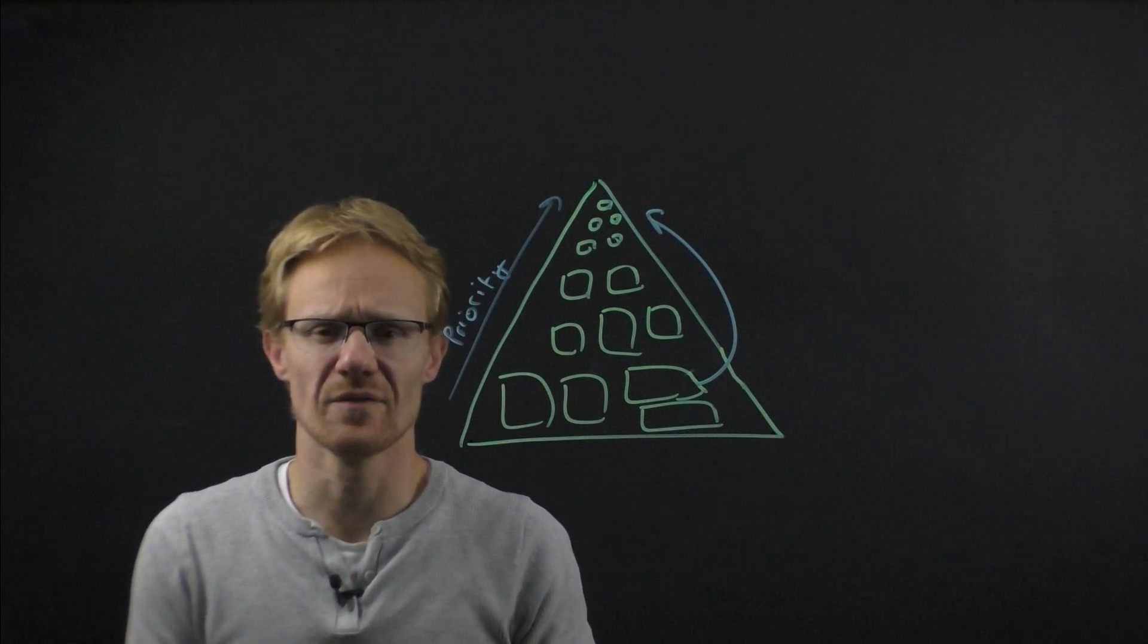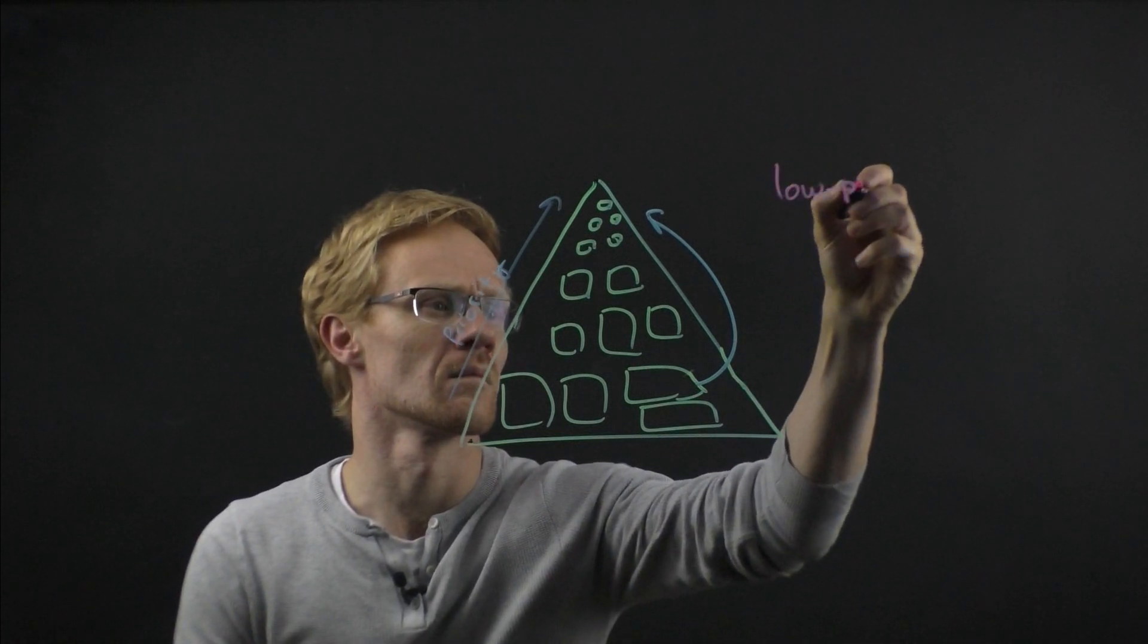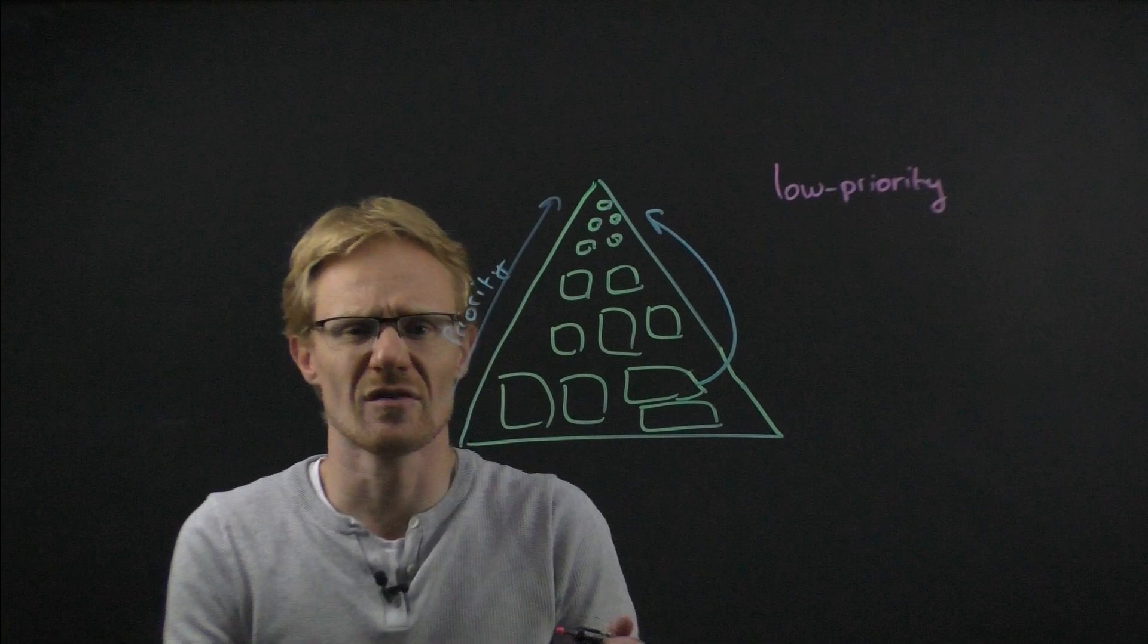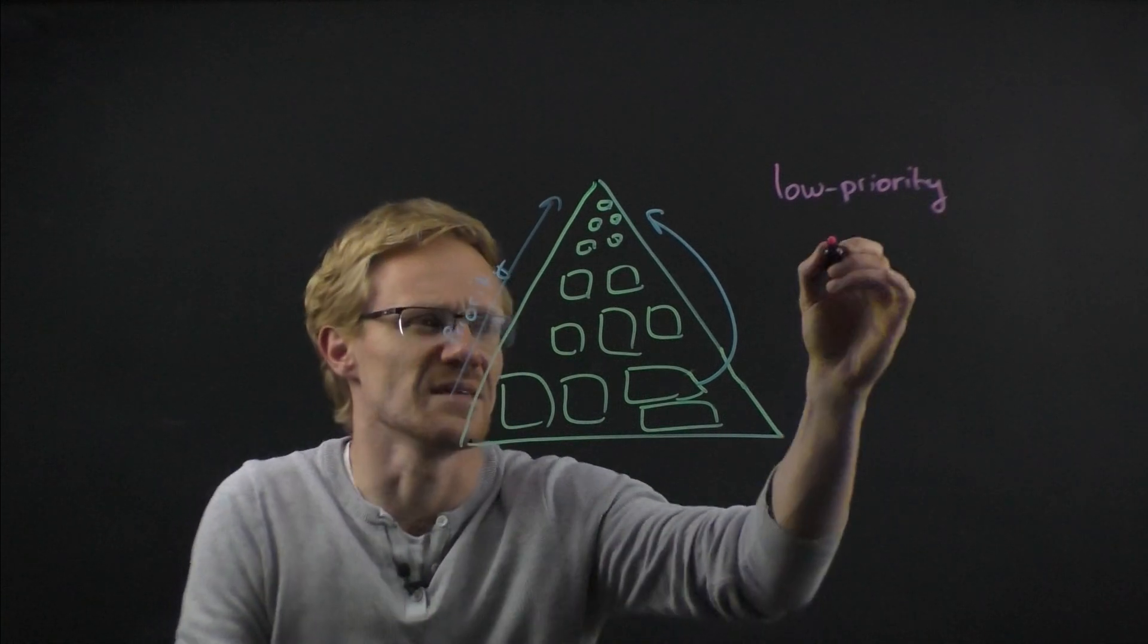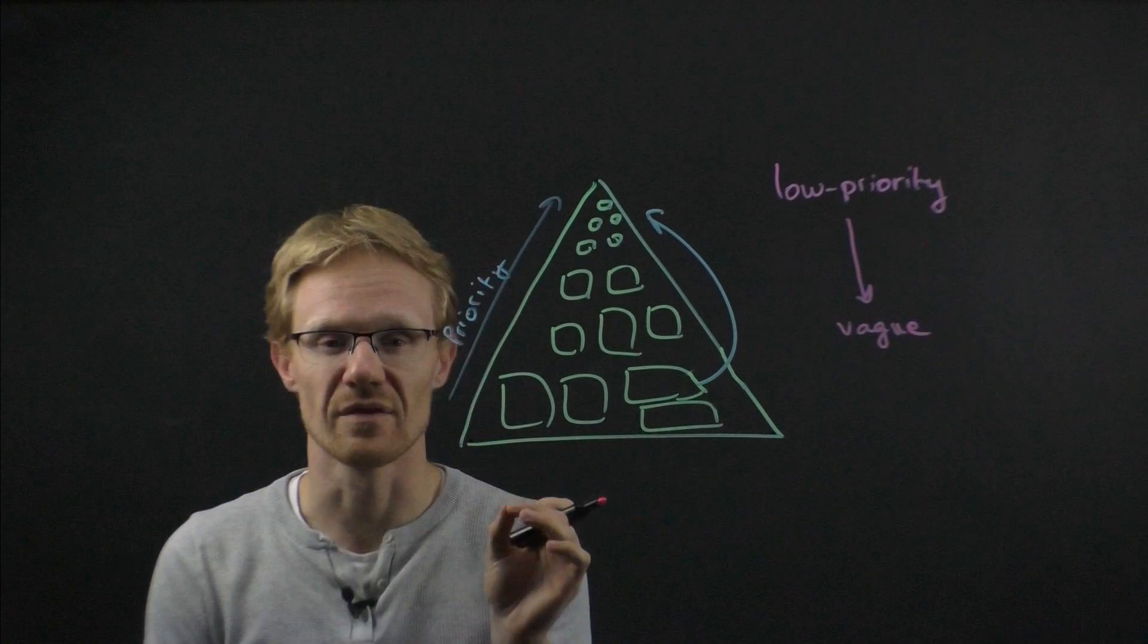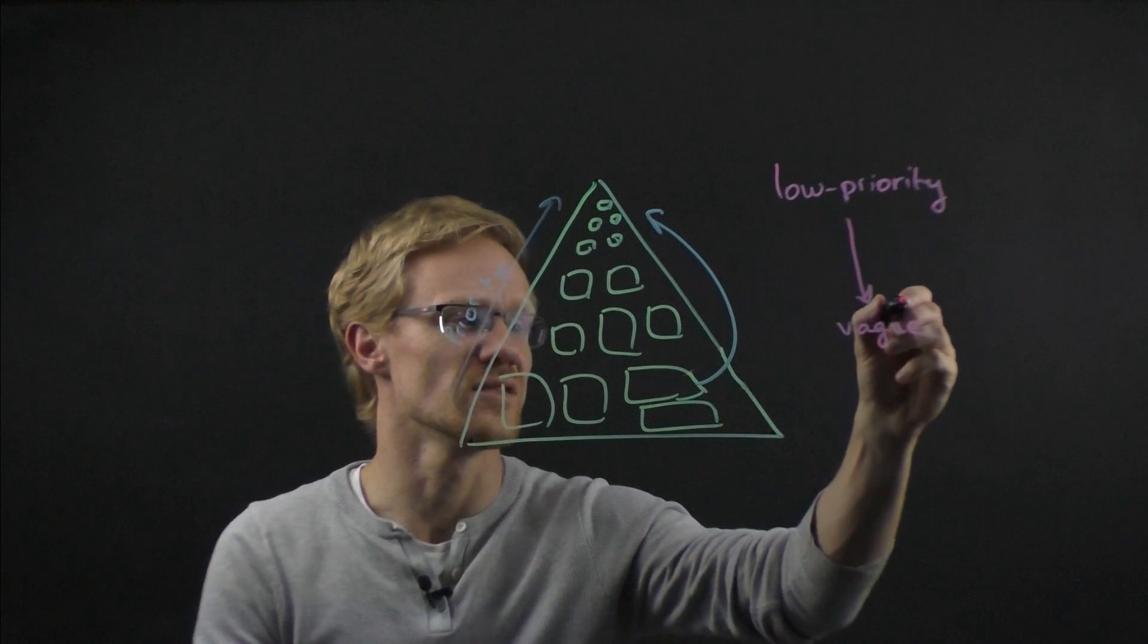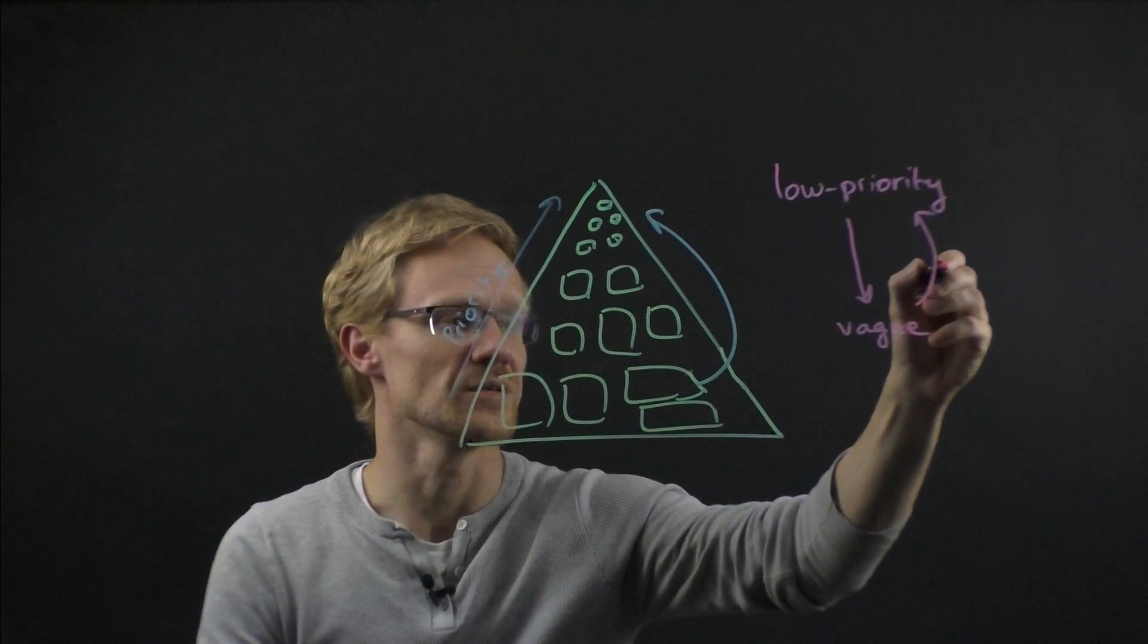So if you think about it, if something is low priority, then it's okay for something to be, well let's say, vague. But here's the key, it doesn't work the other way around. If something is vague, does not mean it has to be low priority.